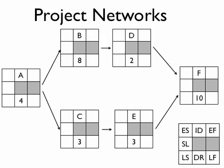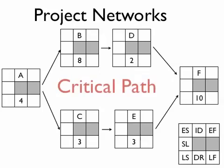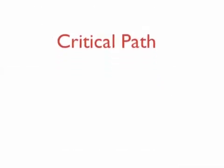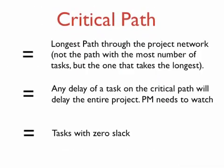Looking at our project network with durations filled in, we can derive all other properties. First, let's identify the critical path — the path through the network that defines when the project ends. Any task along the critical path, if delayed, will delay the entire project. We have paths A-B-D-E, A-B-D-F, and A-C-E-F through the network. The critical path is the longest path, not necessarily the one with the most tasks. Another way to define it: tasks that have zero slack. The project manager needs to watch the critical path carefully.